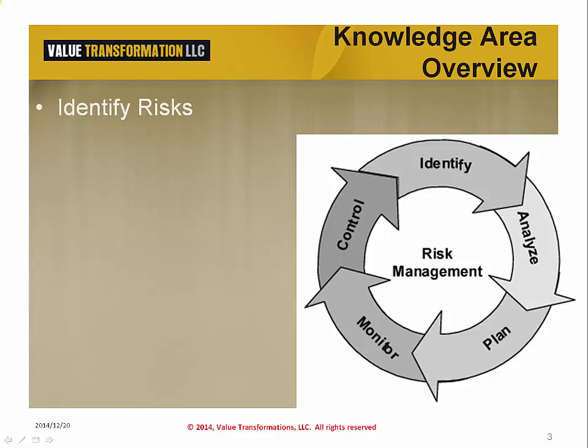This graphic describes the risk management process. This time, we are focusing on identifying project risks. This is the first step. The preceding work was to understand the entire environment and to select the most probable successful approach, be that scope, strategy, or tactic. All of these are important to risk reduction. Now we turn our focus into the project and the execution to deliver. In identification, we want to uncover as many things that can go wrong as we can find.